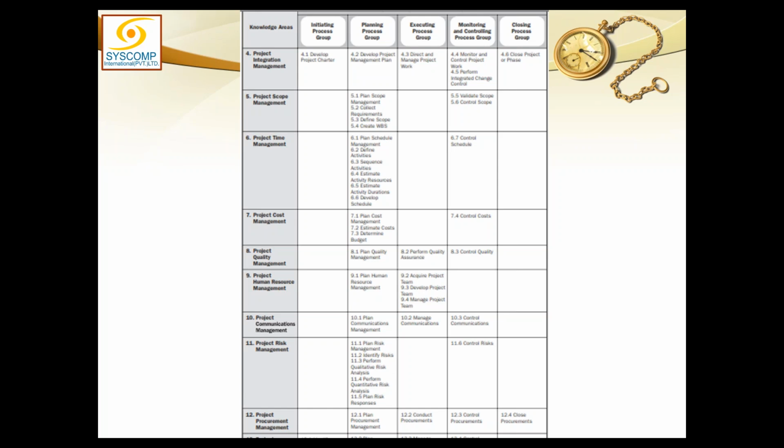Why is it necessary to have a close procurements process? Because this is a portion of the project which has been outsourced. And before we can close our project, we have to be sure that all the procurements have successfully been completed. There is nothing outstanding, no money to be paid anywhere, everything is settled and adjusted. So procurements have also to be closed before we can close the project itself.